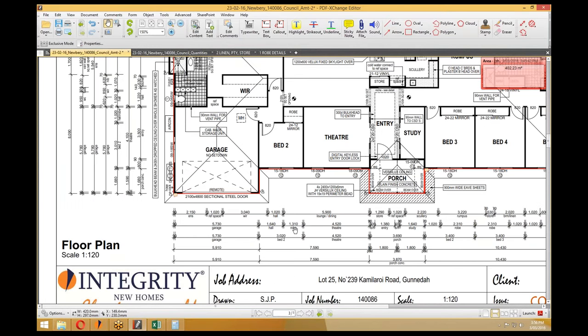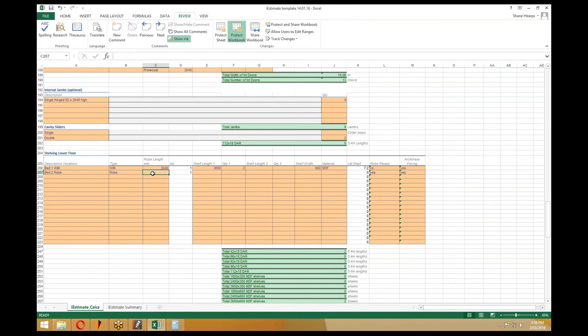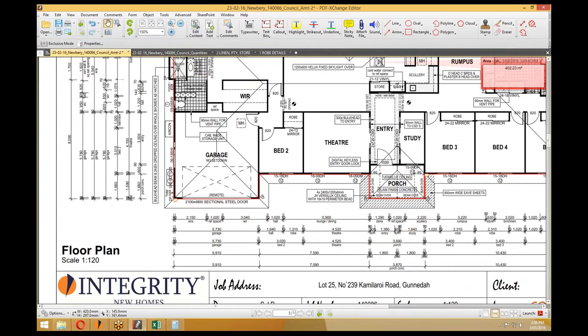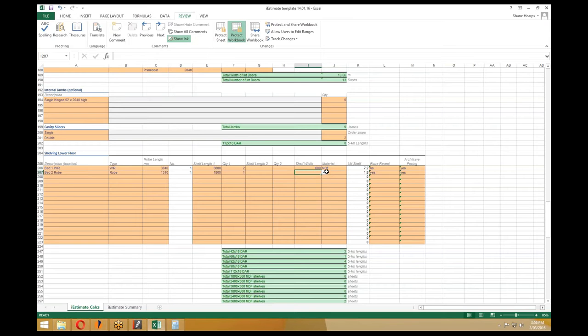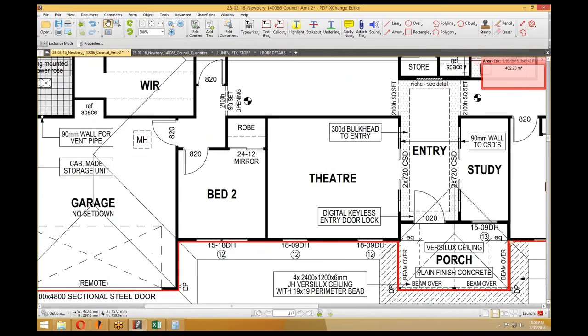So we've got bed 2 robe 11310. Now a robe has one shelf as standard, as it's stating just here, so we can get away with a single 1800 shelf. It is shown as 600 deep, with quite a bit of standing space in front, and it's MDF, and once again it has a standard architrave facing.